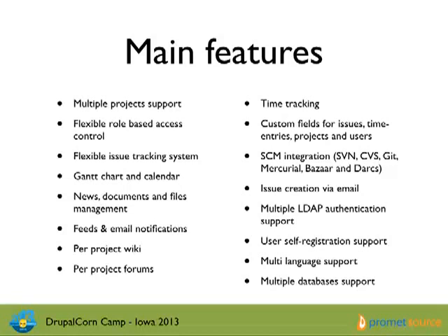customization. Time tracking was a huge one, because we run a consulting business with lots of organizations, and being able to track time at a detailed level, know how long it takes us to do things and whether we're getting better or maybe getting worse at those things, and having that visibility be transparent with our clients and the organizations we work with was a big deal. So having that built right in, and not having to offload that onto something else or integrate with something else, was a big piece for us.